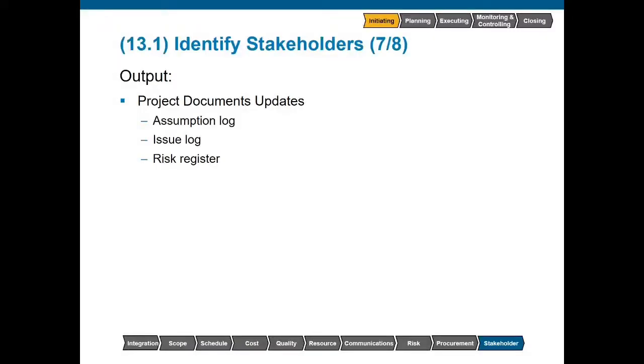So when we do enter this into the assumptions log, we want to put down exactly how did we arrive at these conclusions. Any issues that may arise should be recorded as well, and any new risks identified during the process should be recorded in the risk register.